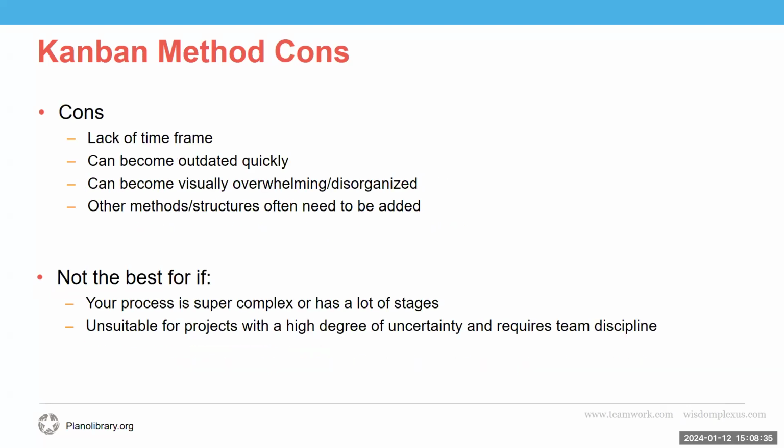On the other hand, there are some cons. It does have a lack of time frames. So the time frames are not listed for each phase. So the teams may miss deadlines or fall behind because those time frames are not listed on the board. Also, it can become outdated quickly, and an outdated Kanban board can lead to issues in the development process. It can also become visually overwhelming and disorganized. And if it becomes overcomplicated, because too many elements are placed on it, then it can lead to distress.